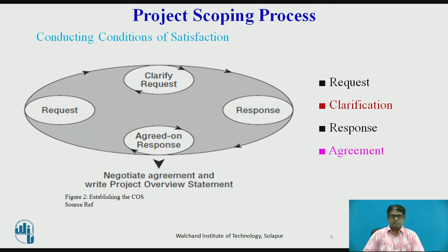Third, response. The provider states what he or she is capable of doing to satisfy the request. Agreement. The client restates what he or she understands the provider will provide. The conversation continues until the provider is satisfied that the client clearly understands what is being provided. At this point, both parties have established a clear understanding of what is being provided in the language of the provider.